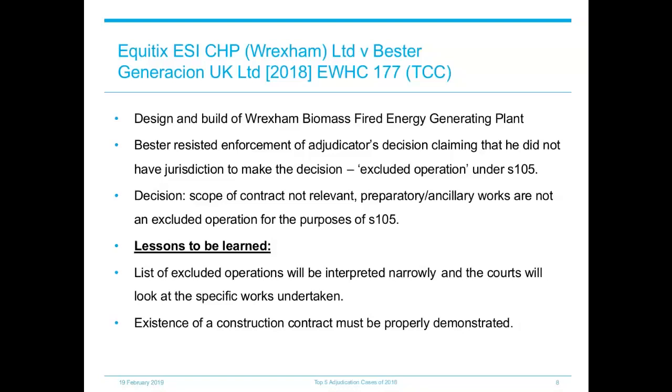The courts looked closely at the 1996 Act, in particular Section 104(5), which makes it clear that it is only part of the agreement which relates to construction operations that will benefit from the right to refer a dispute to adjudication. Therefore, what matters for the purposes of jurisdiction is whether or not some part of the dispute that has been referred to adjudication relates to an excluded operation.